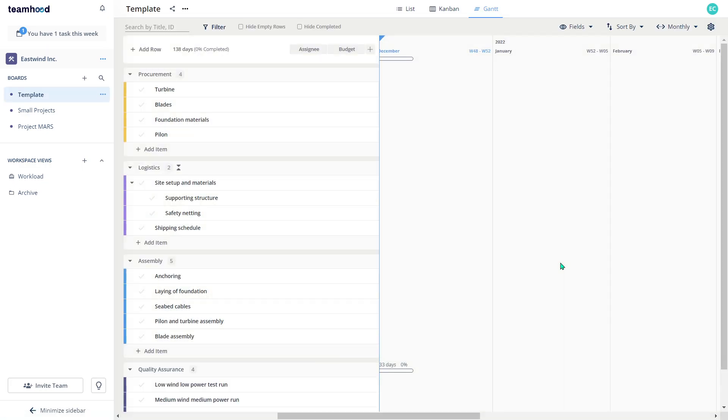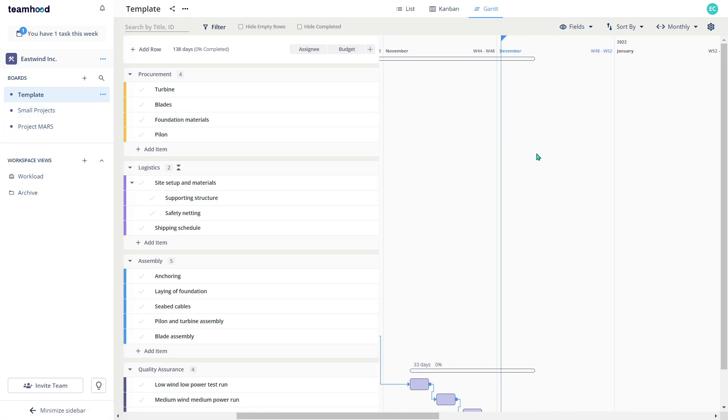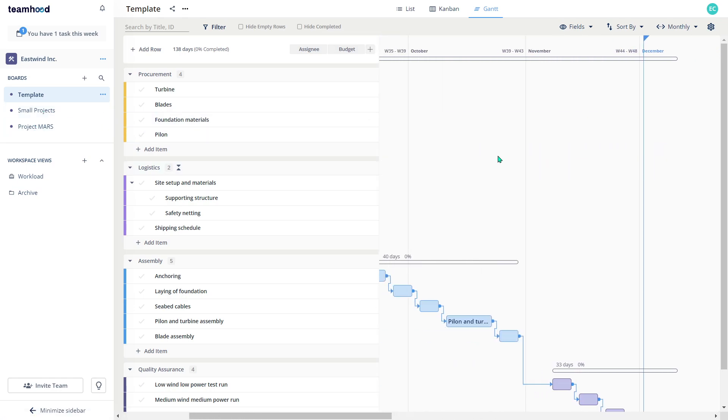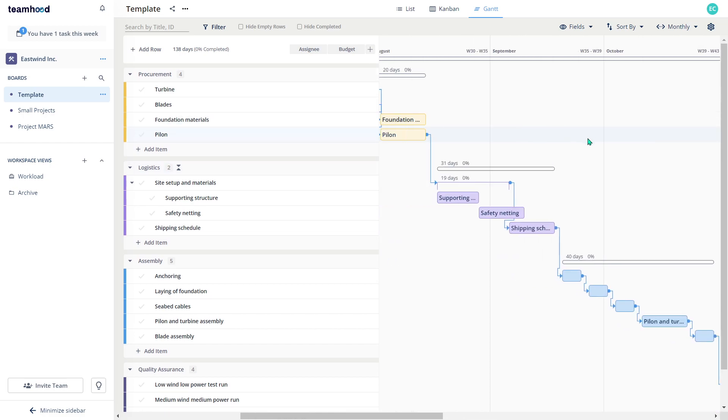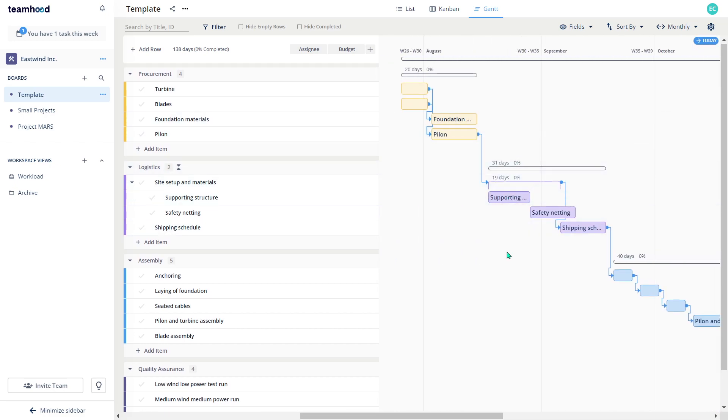Now, when I open my workspace, I get presented with a list of boards on the left side menu. In this case, my company called Eastwind Incorporated has three boards: one called Template, Small Projects, and the last one called Project Mars. Now, in this case, each board is like a separate project for me. And this is what we usually recommend, because a regular-sized project, which takes from 6 to 24 months and involves up to 20 people, fits very nicely into a single board.